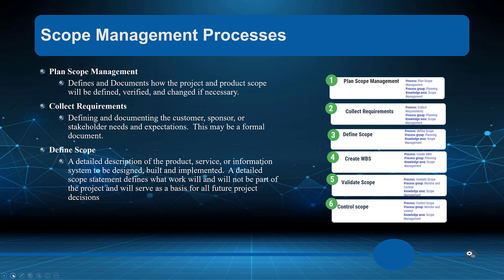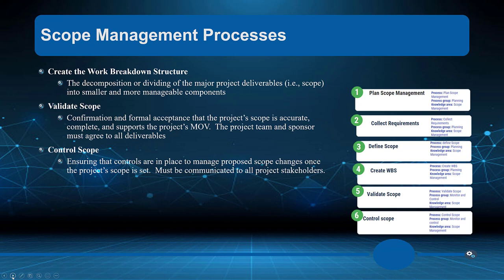We have to define the scope in great detail. A detailed scope statement describes the product, service, or information system to be designed, built, and implemented. It defines the work that will and will not be part of the project. We also need to include things that are not part of the project — for example, data extraction from older systems. The scope management cycle covers collecting requirements, defining the scope, creating the WBS, validating the scope, and controlling it to prevent scope creep.